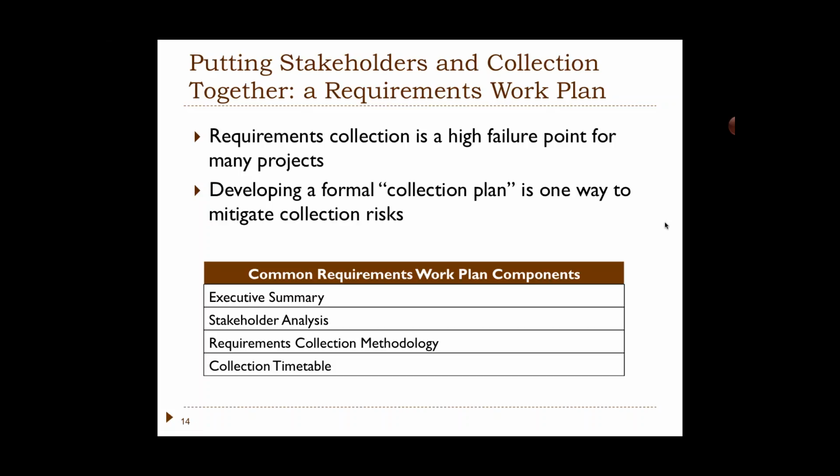And please understand, one of the major causes of project failure is poor scope definition. And the reason that happens is because we don't get the requirements. We talk to a stakeholder and they say, here's what I need. We say, okay, fine, I'll do that for you. We don't really dig down into that and say, well, what does that look like? What does that mean to you? Right? So we probably want to set out a timetable for our collection.